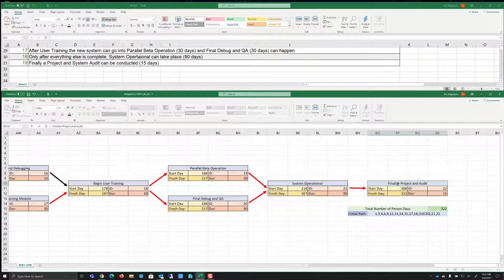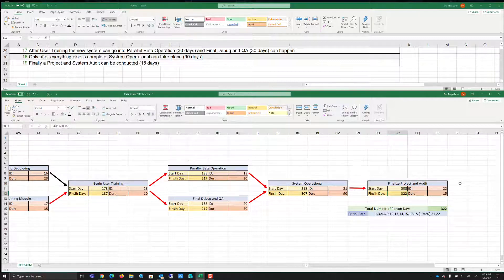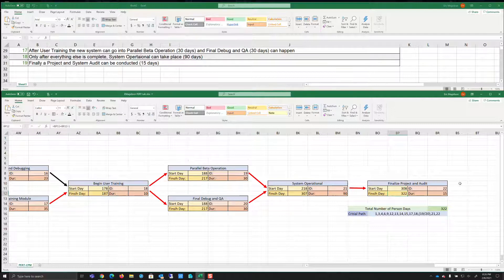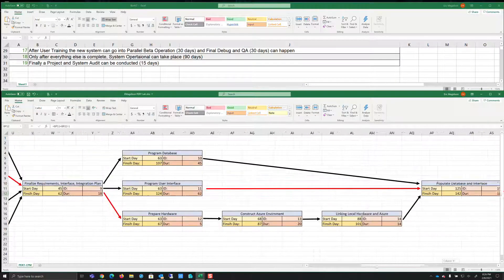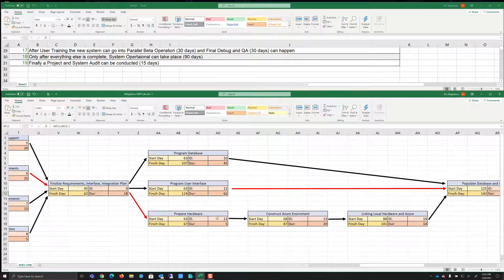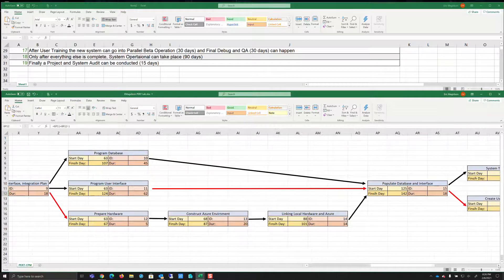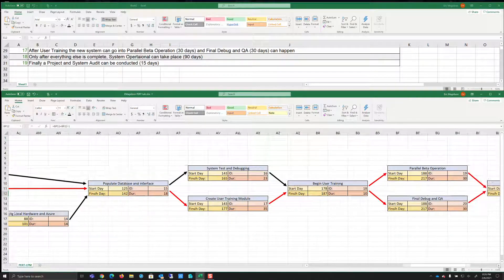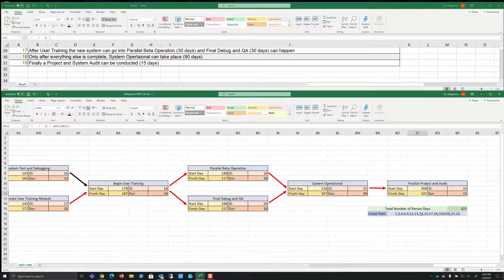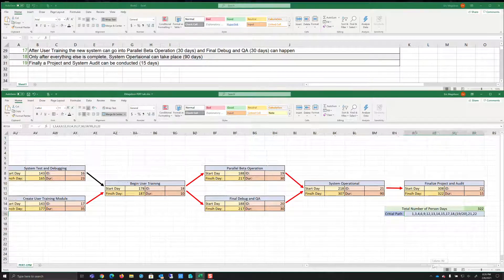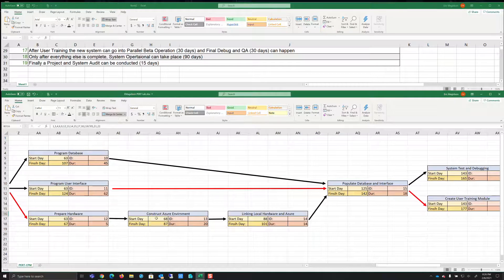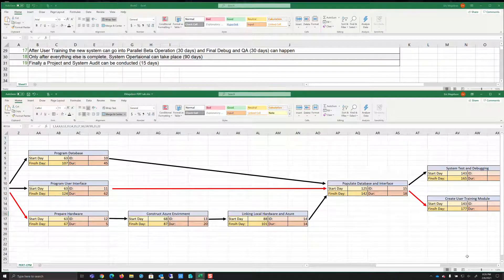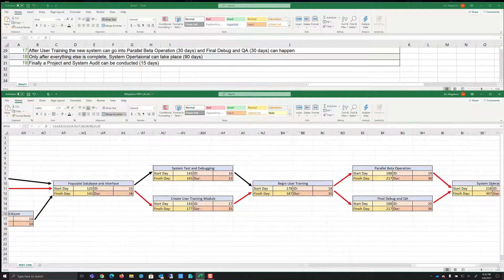Now our critical path needs to change from what I did here. Because if you notice, I had 12 and then I went 13, 14, right? Now it's actually going to go 11 from 11 to 15. So here's what we're going to do. We're going to come back here. It goes from 11. We had 12. See the 12? That was our critical path. So now we're going to do 11 to 15. So we're going to change the 12 right here to an 11.